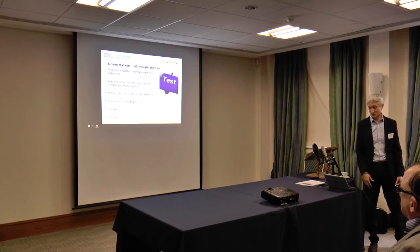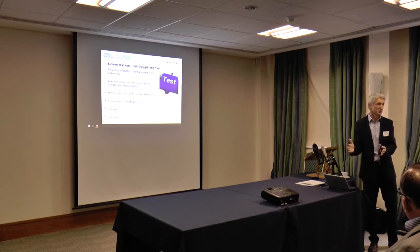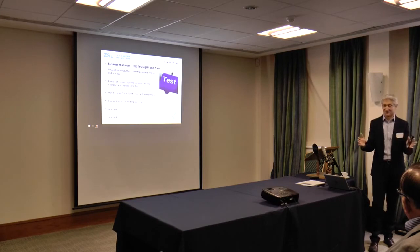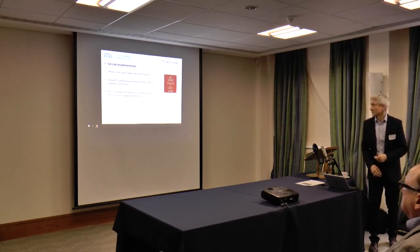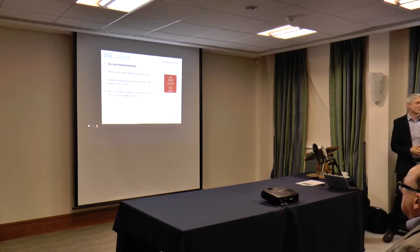The problem, of course, that we all know is that the gap between getting to the point where you configured it and your go-live date may be getting narrower, which is where you're doing your testing. And what is it that gets thrown out? It's your testing. That's part of your risk management. You need to make informed decisions, but ultimately you've got to make a judgment call, because you get to this point where if you've got a fixed deadline, you've got to jump.